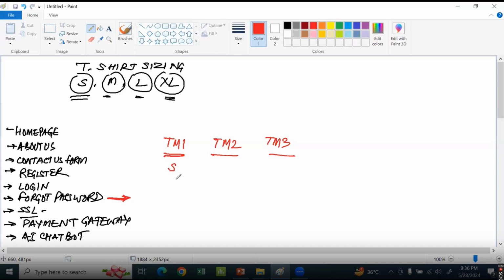Enabling forgot password will not take too much time. This guy is relatively experienced, but not that experienced, and feels this is a medium user story. This guy also feels that, no, this is a small user story. Now we have a discrepancy, so we'll have a discussion. We'll try to figure out whether this is small or medium. We both believe it's small.